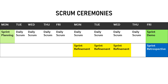The schedule goes as follows: Sprint Planning happens on the first day of the Sprint. Daily Scrum happens on a daily basis. Sprint Refinement, which we touched upon in the previous episode, happens during the second week of the Sprint. Sprint Demo and Sprint Retrospective happen on the last day of the Sprint. We will go over each of these events one by one in the upcoming slides.